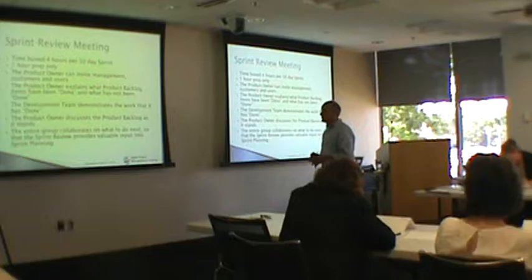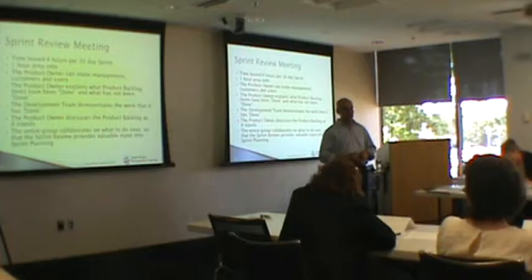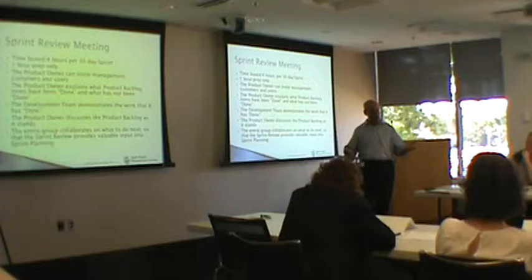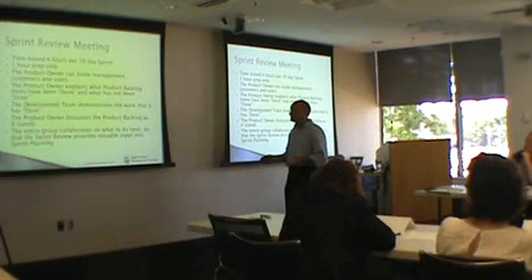Sprint Review meeting. That's a one-month sprint — every four hours. It's one-hour prep, and this is basically saying to the developers: don't spend a day preparing for the sprint review. This is supposed to be quick. You should have your tools and things in place so you're not spending time demoing. Because every two weeks, if you're spending hours and hours demoing, you're not doing work.